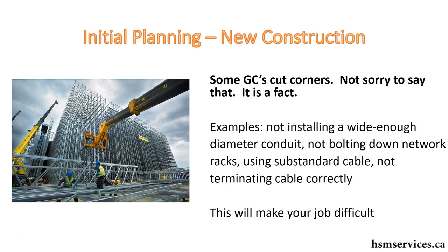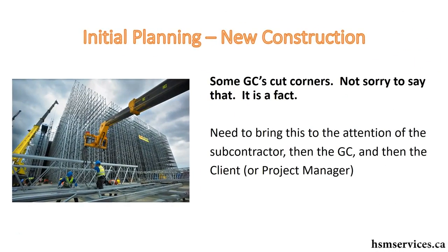So how do you prevent that? Well, you need to be on site, and you need to be inspecting things during the construction phase and communicating with the contractors and with the GC and with the client. If something isn't being done right, you need to explain to people it has to be redone properly. Otherwise, it's not going to work. Put everything in writing. That helps with your warranty in case there's a dispute later.